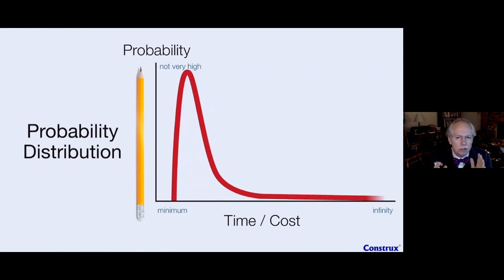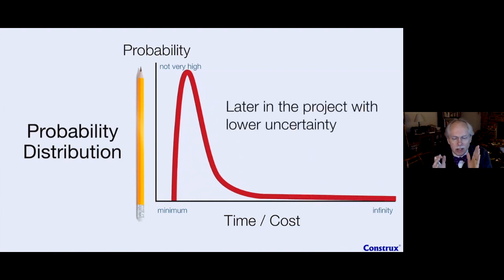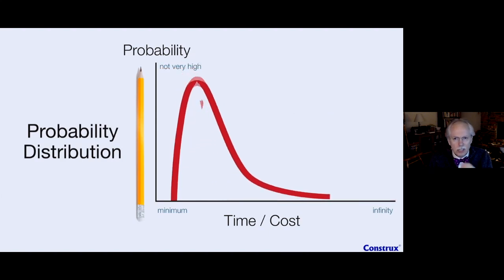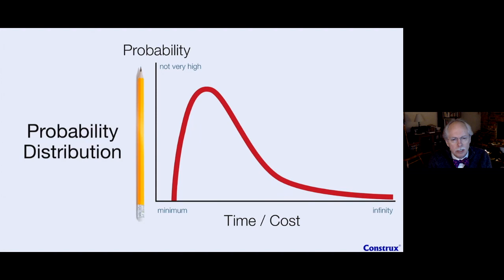In a similar fashion, as we move near the end of the project, or even three-quarters of the way through, we're going to see that curve narrow quite a bit. In fact, this might become a high number, so we can cross that out a little bit. We might even get something in the 50-60% range rather than the 1% or 0.5% range. Because as we get further and further on, hopefully we have much less uncertainty, and so that curve can really squish. But we'll stay here with our middling curve, because it's easier to talk about our three estimation points.